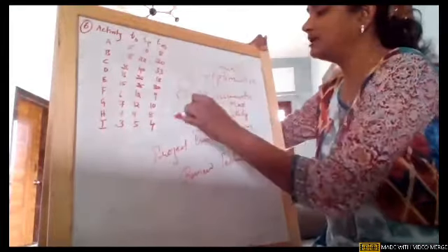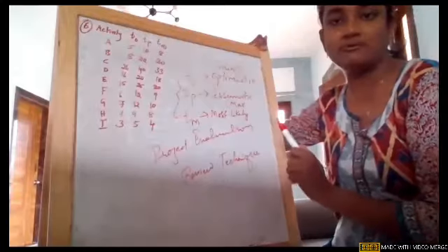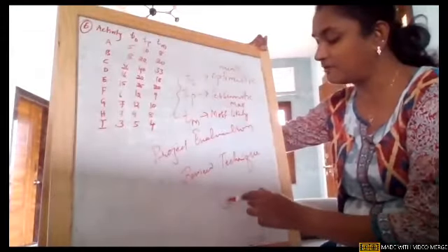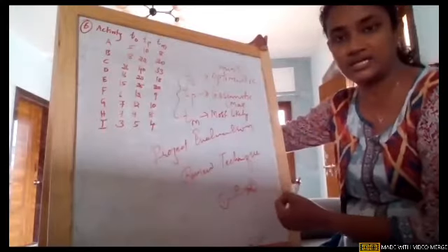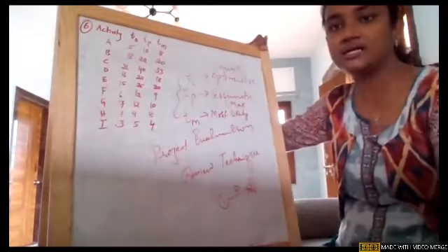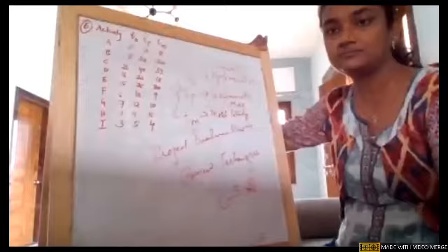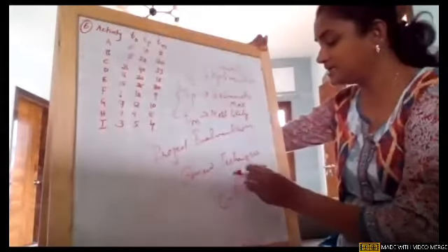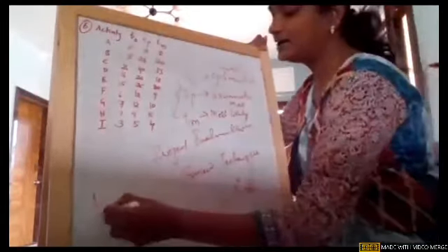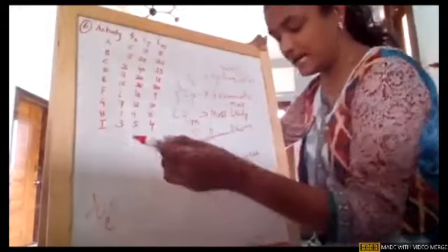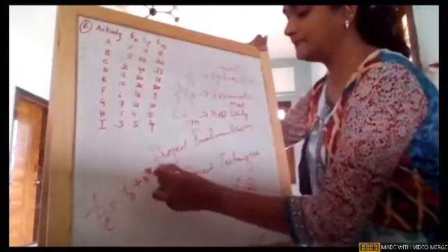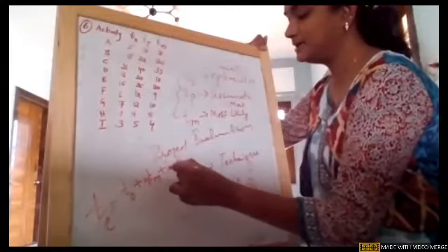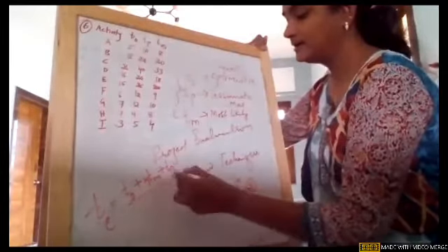But these three we are not going to use directly on the network. Now, when I draw an activity 1 to 2, I need to write the duration here. So what duration comes here is TE, where TE we derive from the three durations: TE is equal to TO plus 4TM plus TP divided by 6.